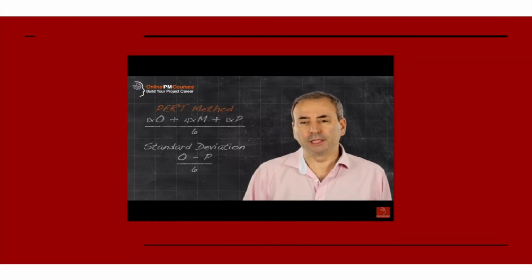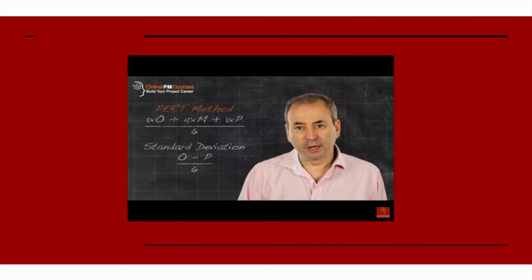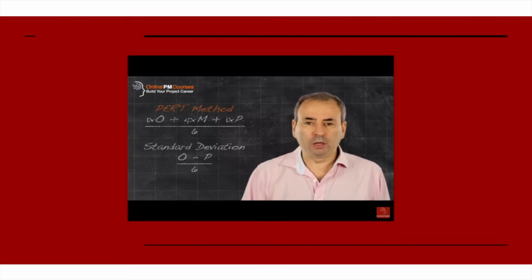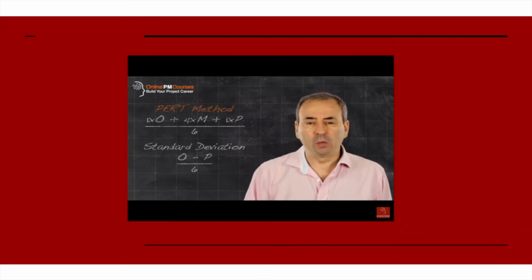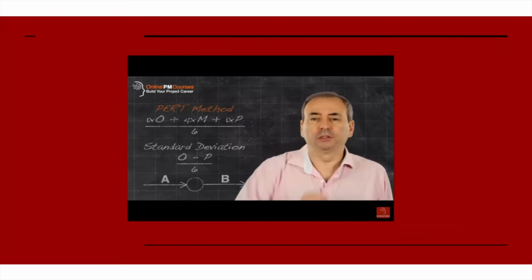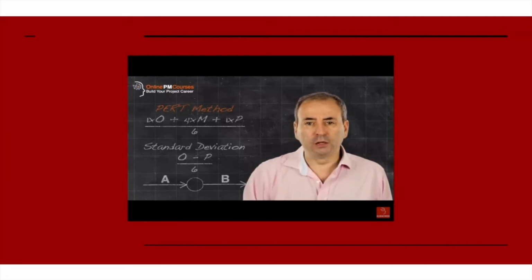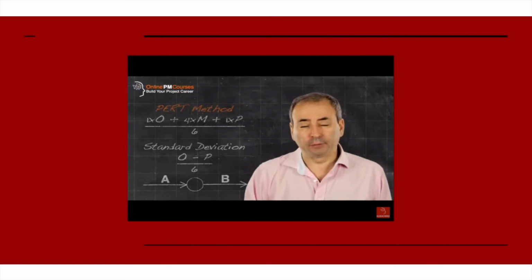So the PERT methodology is a way of estimating the duration of projects, firstly by building a network where the convention is that we use the arrows to define the tasks, and then the nodes show how the arrows relate to one another. And secondly, the lengths of those arrows, the durations that are recorded on those arrows, are based on 3-point estimates from which we can calculate average durations and standard deviations.